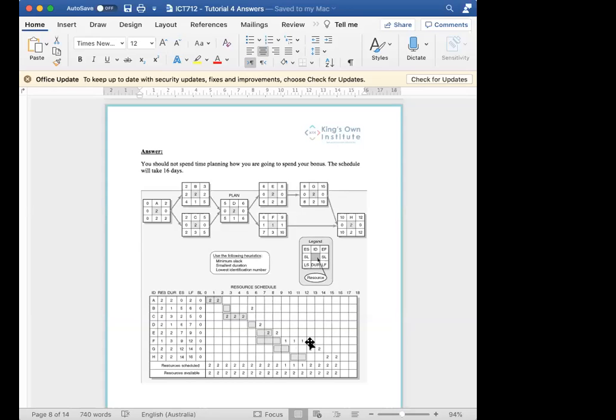Sir, tell me, is it like E and F can be done at the same time? If you have resources, but you don't have resources, you only have 2 people. So you've already used them to do the E, which is minimum slack. Oh, okay. So you can't start them at the same time. Oh, it's 2 people. Yes, I see. Correct. You only have 2 people. Make sense?